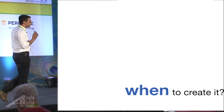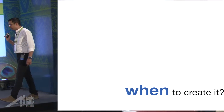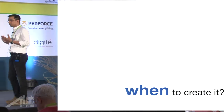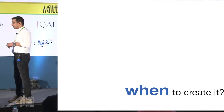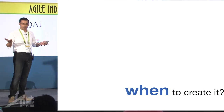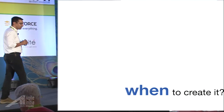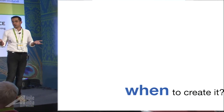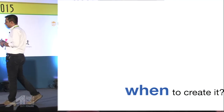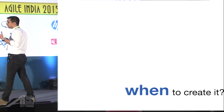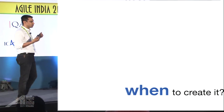The first challenge for us: when to create the examples? Should it be as part of sprint zero, handled sprint by sprint, or should we have separate workshops to onboard all stakeholders? We kept it simple — we leveraged PBRs, because all the stakeholders are already part of your Product Backlog Refinement sessions. For every two-week sprint, we use one day of PBR to define examples while grooming stories for future sprints.